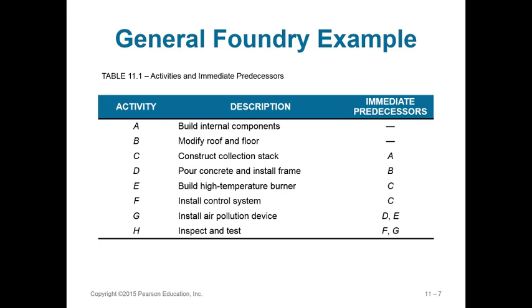Now, these are the activities. They're shown in the text, and some things are critical for you to see straight off. These two, A and B, do not have any predecessor activities. That means when they start, they start. As a result, A does not depend on B and B does not depend on A, so two separate teams could be working on this.